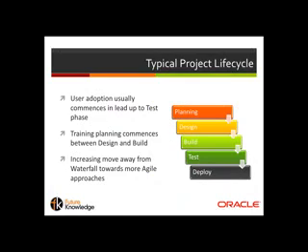And what we've typically found in the projects that we've worked in is that user adoption usually commences in the lead up to the test phase. So actually connecting users to elements of the solution comes so late in the piece that realistically that user input is not really of any value to the project, and it quite often comes too late to be as effective as it might be. And it's typical for us to start building and developing a training program in the design build phase as well.